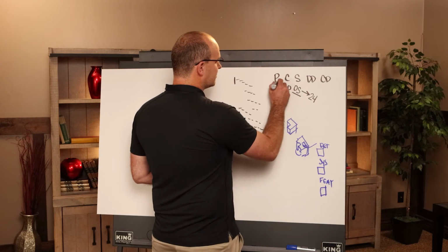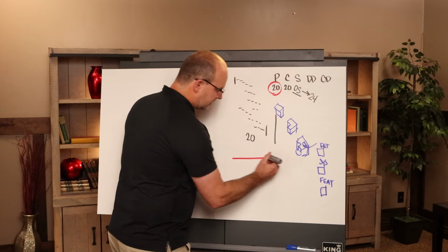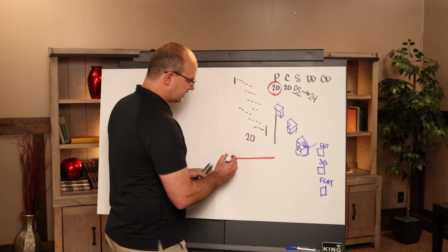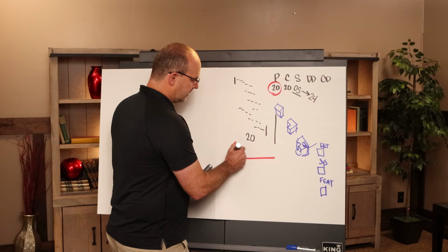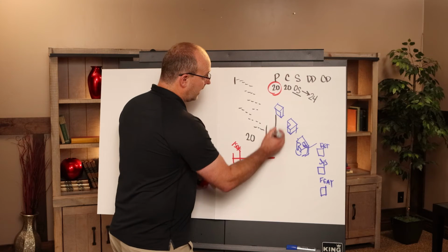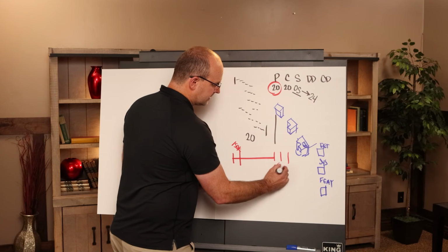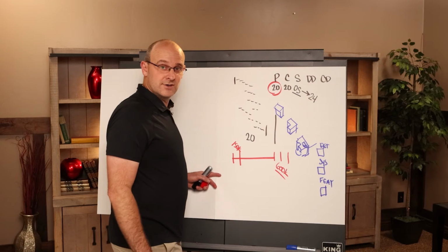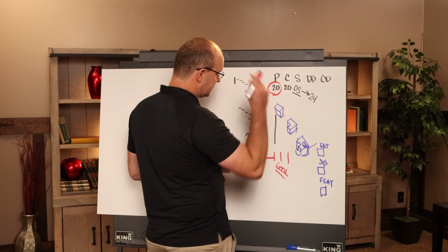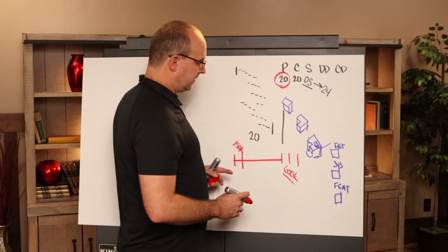When we said this was a 20-month project, 20 months in for the general conditions for the staff to be on site had a certain burn rate. Let's say it was 150K. Okay, so now if you add 4 more months to it, you've literally just added 600K. I don't math very good, but I think that's what it is. But 600K to the overall total project cost. And this is just a simple, small example. On a larger scale, this can be a bigger deal.